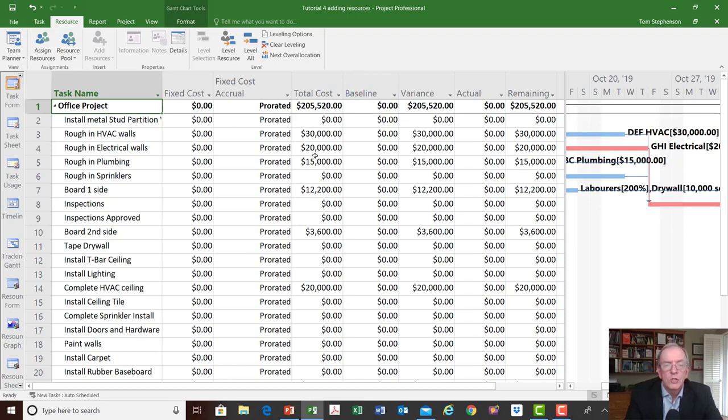And then if these amounts change, it's going to look at the variance, the difference between what's going on in your project, what you plan to go on the project, and what the difference is. So if you're over budget, it would show how much your variance is, over budget or under budget. It will show you how much money you've spent or actually incurred up to that point, and then it would tell you how much is remaining based on the difference. So that is quite helpful when you start to monitor and control your project. So everything we're doing now will help us later in our project.